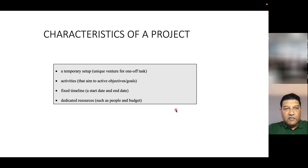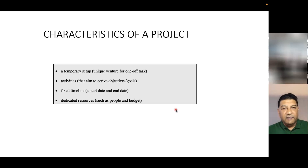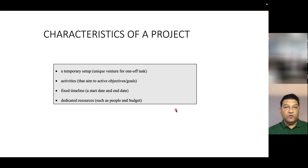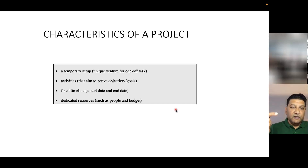A characteristic of a project is that it is a temporary setup. You come together as a team for a unique venture, which is a one-off task. You need to understand the activities that aim to achieve the objective or goals. A project has a fixed timeline — a start date and end date — and dedicated resources. For your assignment, the dedicated resources are the four or five people in your group, and you need to assign which person is performing which task.